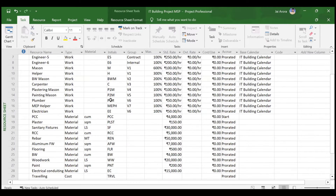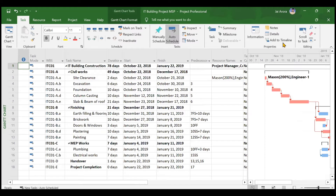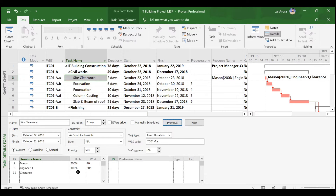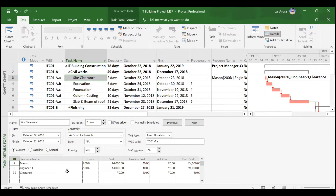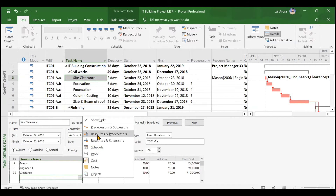For demonstration, we will add the 'clearance' cost resource to the site clearance activity. Open the detailed view, go to site clearance, add the clearance resource, and click OK. Since it is a cost resource, there are no units or work — just add the cost. For example, if clearance costs 10,000 rupees, enter that in the cost field and click OK. This amount will also be reflected if you add a cost column to the table. We will cover cost in detail in another video.